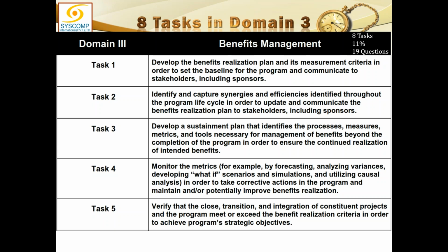So the whole story is encapsulated in the management plan. But the management plan does not know exactly what the risks will be. It only provides you the mechanism, the method of how to identify the risk, what tools to use, and things like that. As far as the risk management plan is concerned, it does not know what the risks will be, what figures will come out of it, or what responses will come out of it, but it gives you the mechanism.